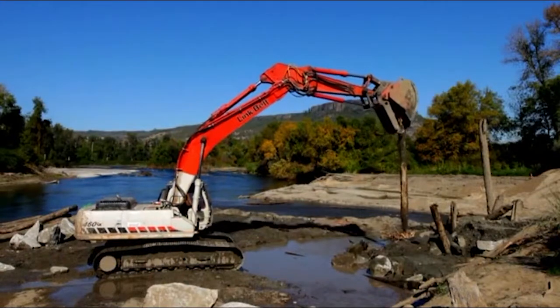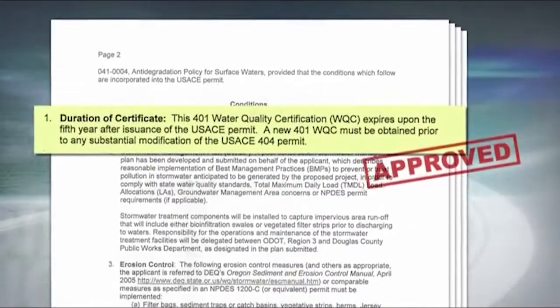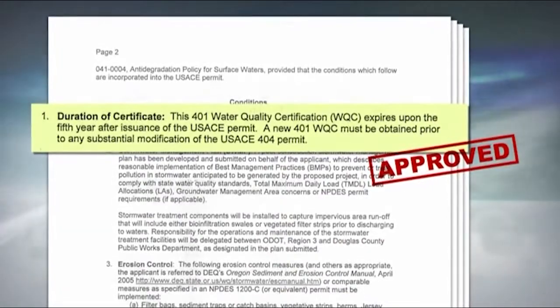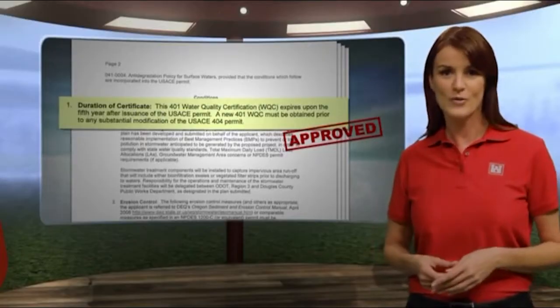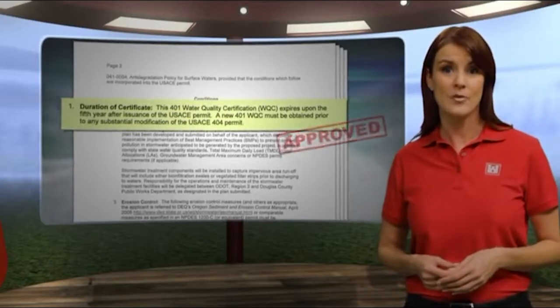Projects that involve putting material into water must be approved by the state under Section 401 of the Clean Water Act. The Corps can help facilitate the 401 review process, but it is your responsibility to send your project information to the state for its review.